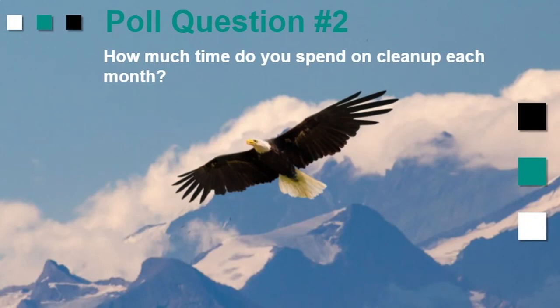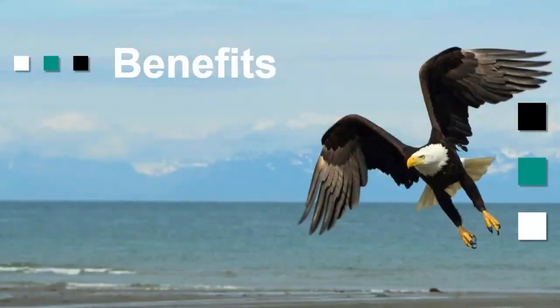But what we're trying to do is give you tools that allow you to do more updates more often. This is hugely important because if you can get your updates in more than once a month, and if you're doing them monthly, the data you're using in those updates could well be old. It could be 2 weeks old. So you could be working with 6-week-old data, which is not the best. So we're trying to give you the benefit of having better data available more regularly with these sorts of tools.